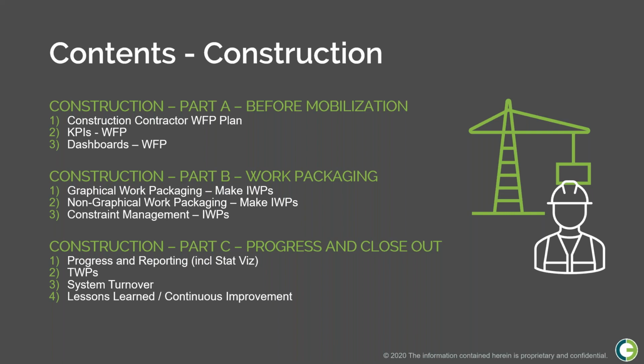Next, we're going to cover the key topics of graphical and non-graphical work packaging for making IWPs. And for those of you not familiar with the terminology, by graphical, what we mean is taking a copy of the model, which we'll have upgraded to what we refer to as a virtual construction model, that data-attributed engineering model with additional information built into it, and literally dragging and dropping spools or bits of steel out of the model into a bucket saying, this is my IWP. So instead of doing everything off lists or trying to compile IWPs manually, we can literally use the model and drag those in and create graphical IWPs.